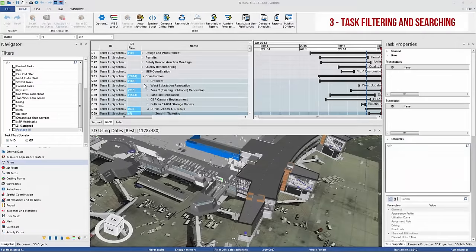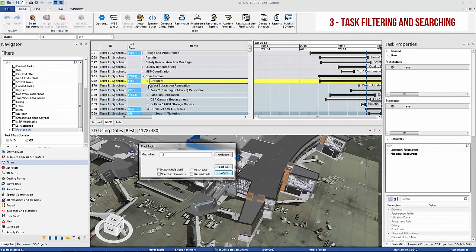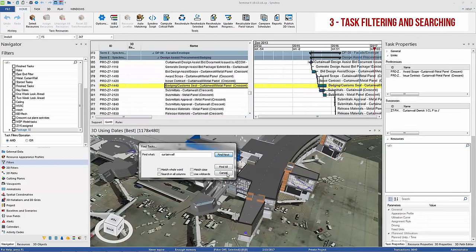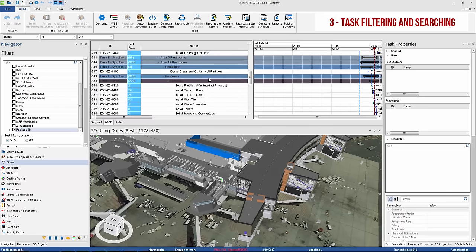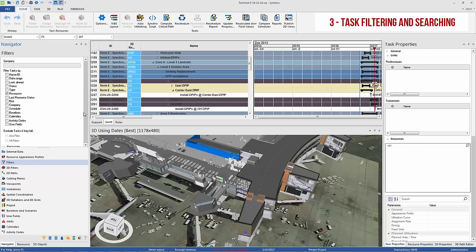To make the 4D process easier, Synchro features powerful schedule and 3D filtering and searching tools, including the ability to filter by names, user fields, lookahead, date range, activity codes, company, critical pass, and task status.